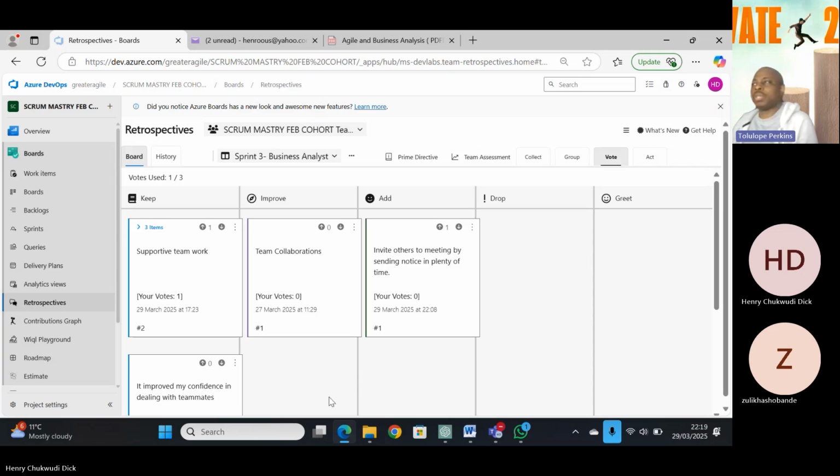So what will be the teamwork then? We need to be explicit on what we are writing so that it is just straightforward. Over to you, whatever the team wants to carry into next sprint and monitor. Even for your retro items, they were not monitored. Nobody created any tasks for them, and Scrum Master, you're supposed to be in charge of that.